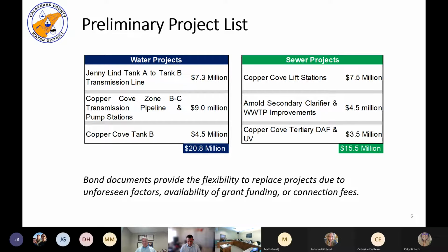I actually got an email from Tom Hicks and Tom Platts saying they're going to have an excess of about 19,000 cubic yards from when they build the road through there. So that's about 20,000 cubic yards. And so we have a shortfall of about 80,000 cubic yards still that we have to go find a borrow site for that material.